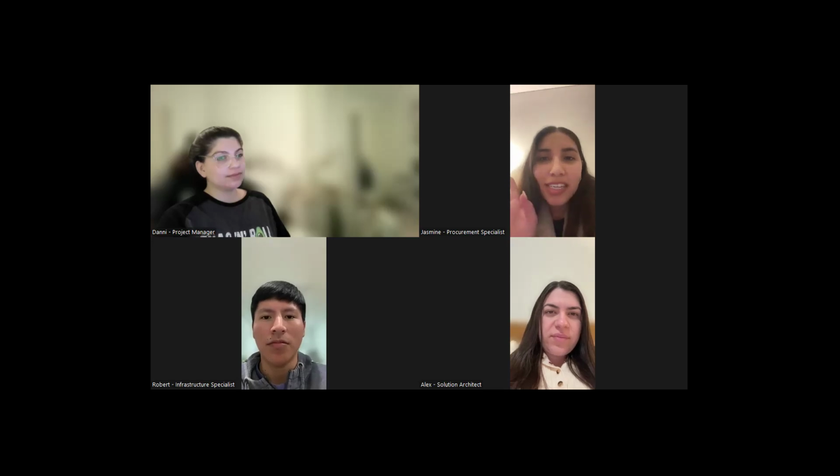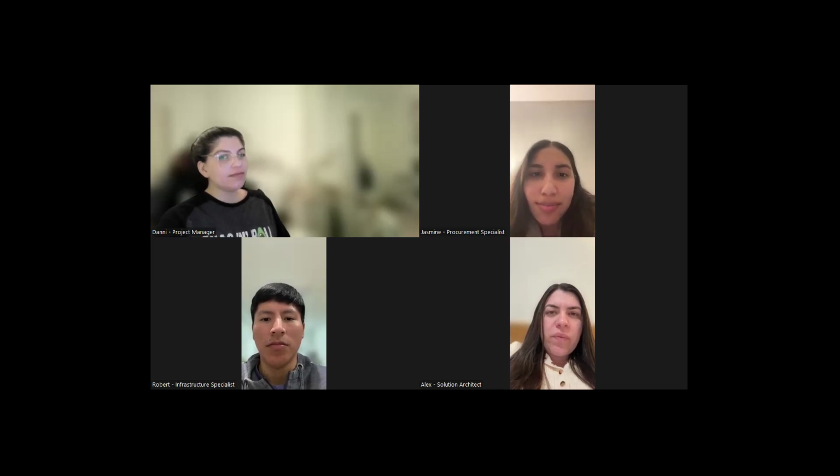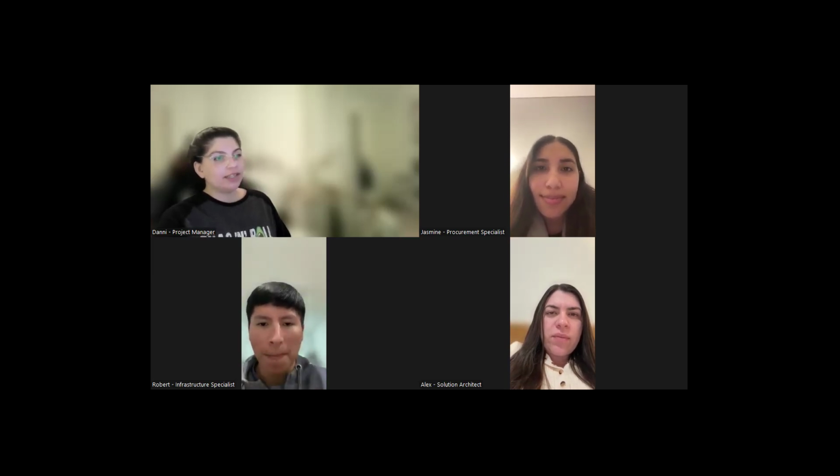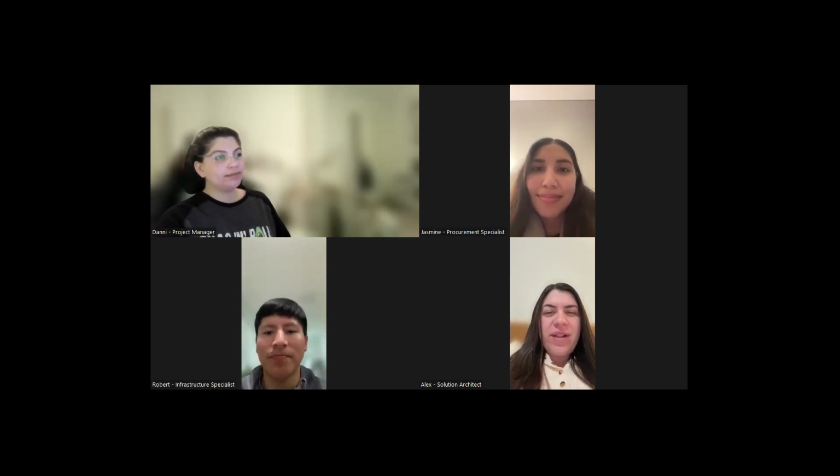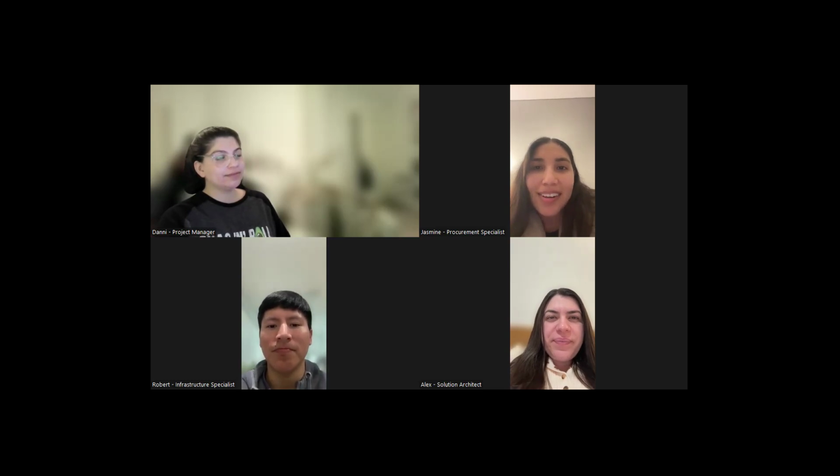I'll just jump in here. If you're expecting to need new licenses, I'll need the tool names and quantities soon so I can start the procurement process. Some of those subscriptions can have longer approval cycles. Good call, Jasmine. Alex, can you confirm the tools you want by Friday? Absolutely, I'll get you the list. Perfect. That'll help me lock in pricing and avoid surprises.